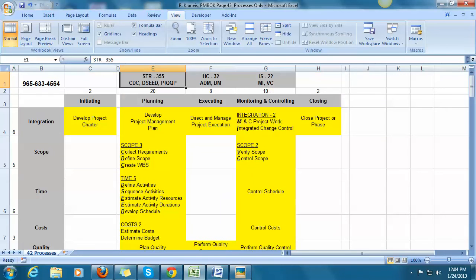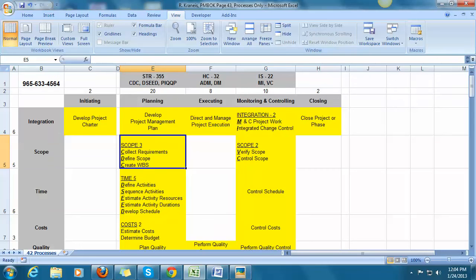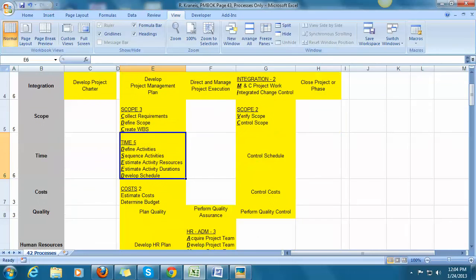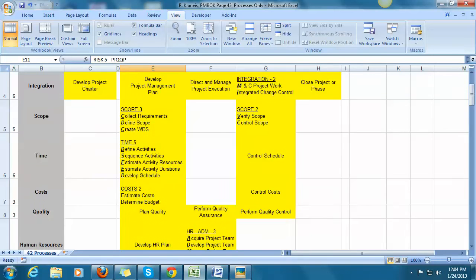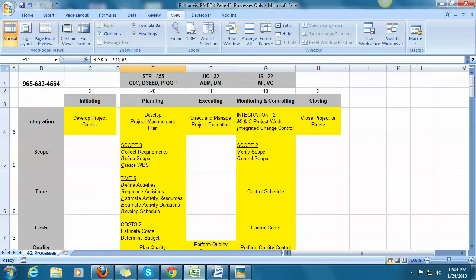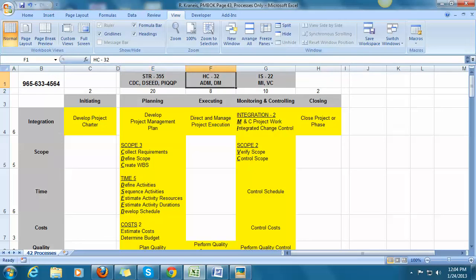And what does it mean? It means that S is going to be CDC: Collect requirements, define scope, create WBS. I know that time will be DSEED, and I know what that means. And I also know that risk is PIQQP. So the learning acronym for planning is STR 355, CDC, DC'd, PIQQP.